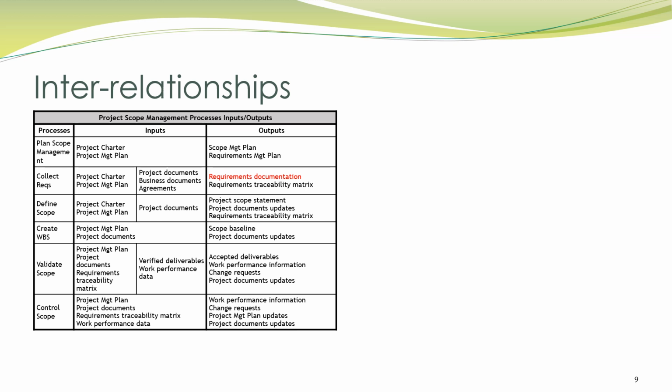Only the requirements of the current iteration are fully documented. The rest are in the backlog. Nonetheless, they must be sufficiently elaborated while they are being worked on, regardless of which project lifecycle you are using.